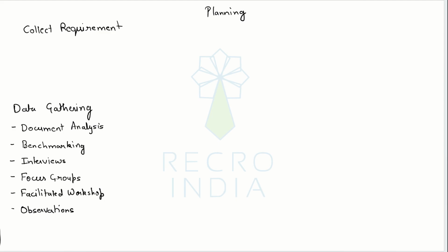However, what we can do is align an expert to just sit down, observe their current ways of working, and identify where there is a gap or what can be an opportunity for improvement with the help of our current project. So, say for example, I go to my payroll team to understand what expectations they have, but they don't give me any positive response simply because they are not aware of the technology, or they don't know how the technology has evolved in recent years.